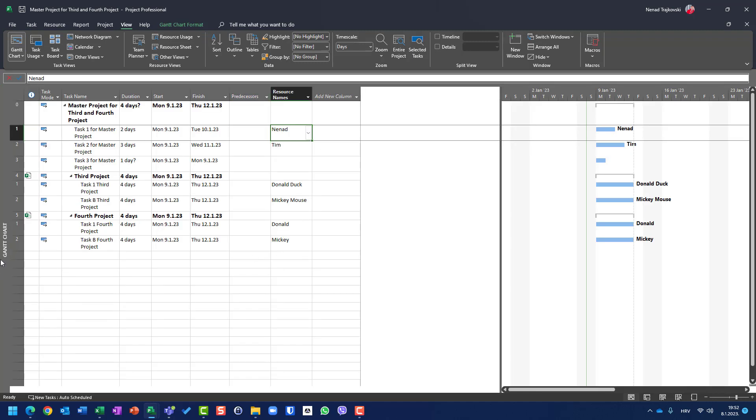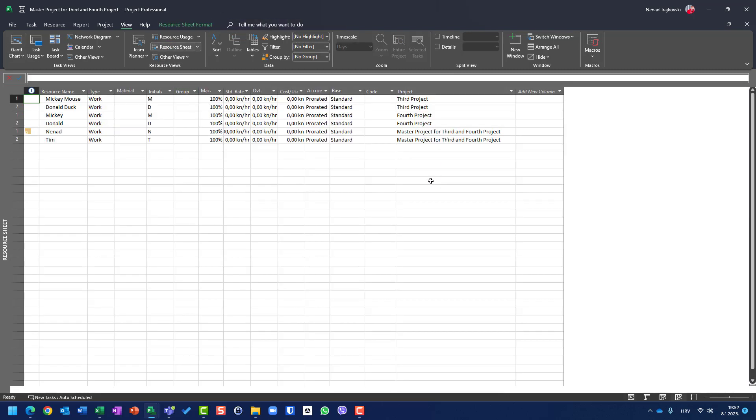So basically, to conclude this video, when you use master project with projects in which you have one or multiple projects with their own resources without resource pool, and you have some number of tasks which belong to master project itself, not to sub project, you cannot create resource via resource sheet, but you should put them directly on resource name and then edit them in the resource sheet as you can see here. Hope this helps. Be careful and see you soon.